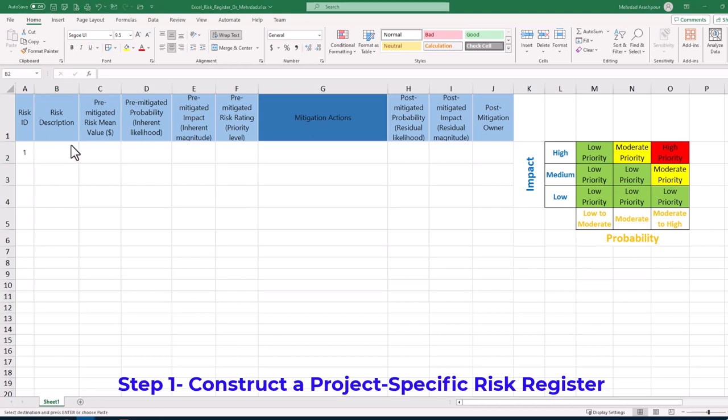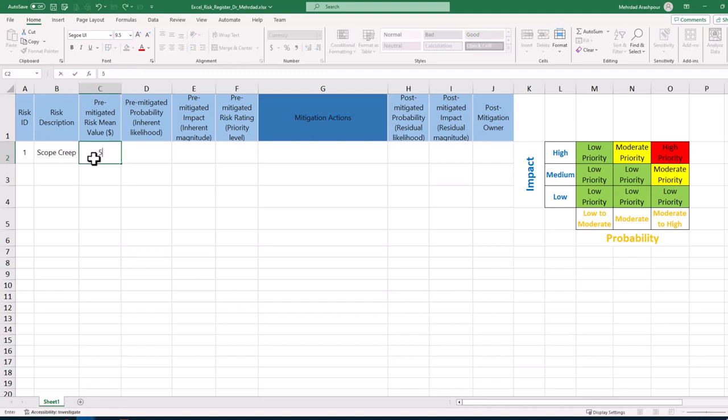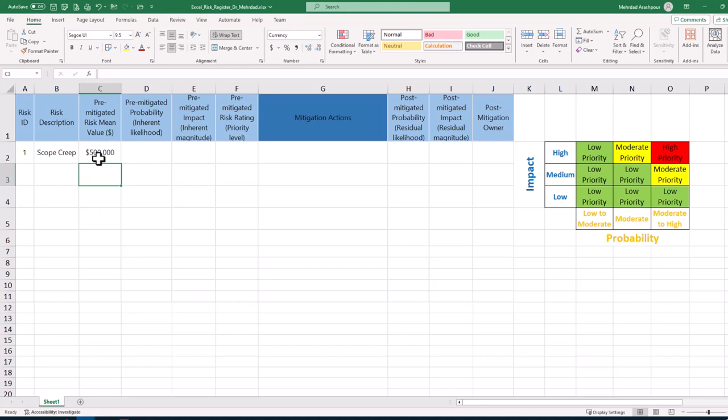Step 1 is to construct a project-specific risk register. We start with unique IDs and short descriptions for all risks which can be identified in a brainstorming session with all project stakeholders. Next we decide on a pre-mitigated mean value for each risk which is an important component in our integrated risk register to have unified dimensions when setting contingencies.